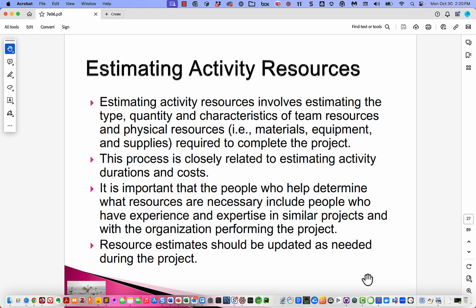And a lot of the planning tools, even fairly inexpensive ones like Microsoft Project, when you change the staffing on a task, you can set the defaults as to what you'd like the product to do. For instance, you can set the defaults such that if you have two people working on a task that takes 1 week and then you take a person off, it'll change the duration to 2 weeks.